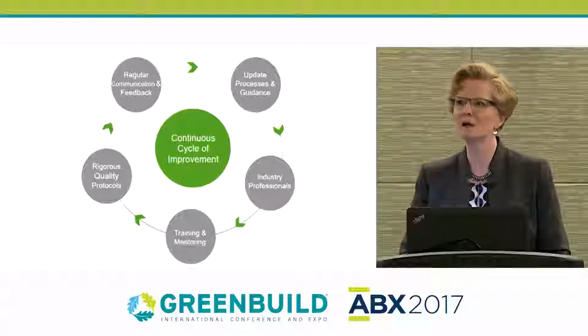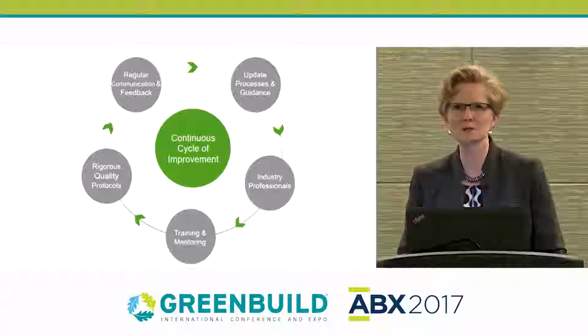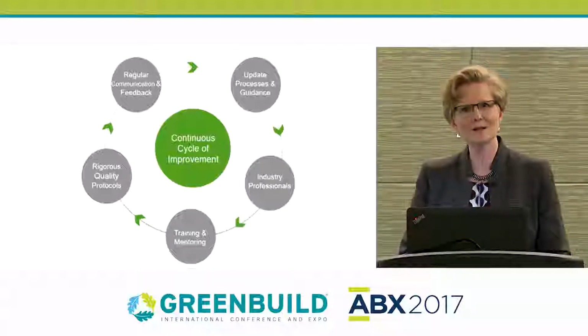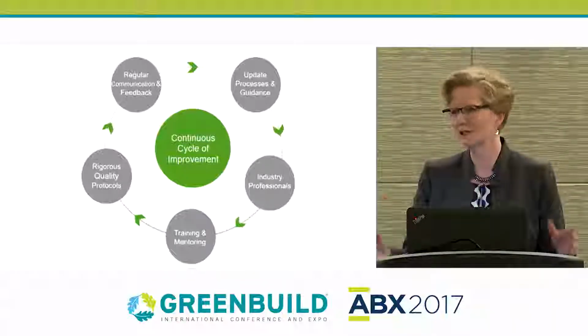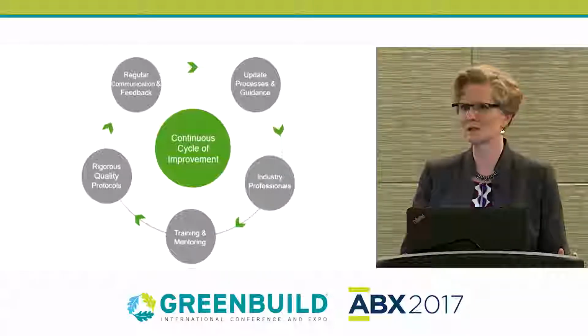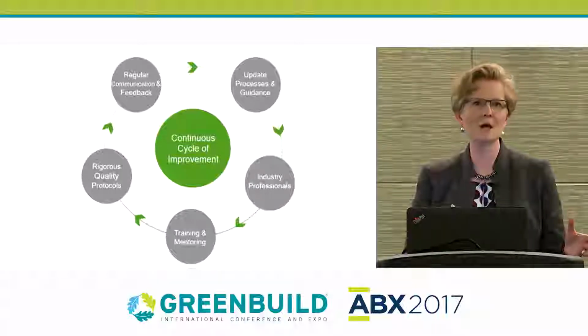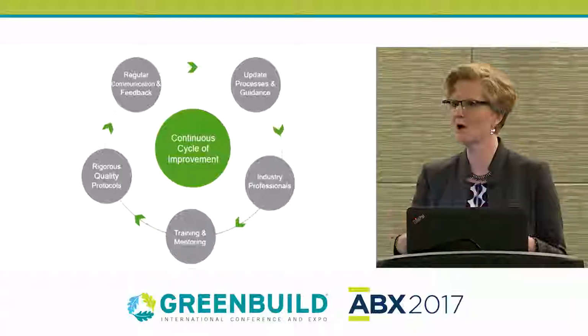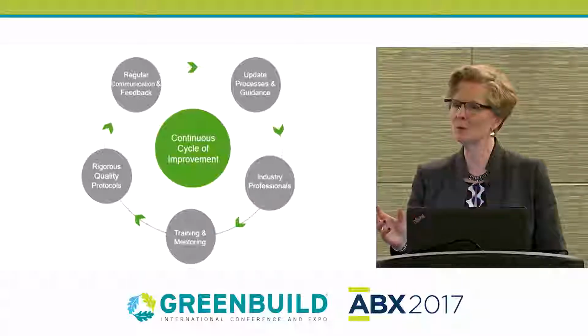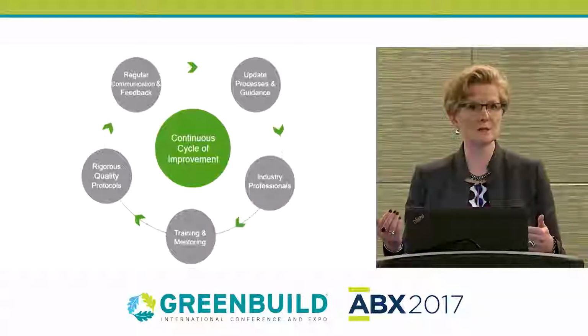We're looking to see if we can't start to move and shorten those timelines from 20 business days in 2018. But if you think about that BD&C project that you're submitting, and BD&C is the meatiest of them all, it's not that it takes us 4 weeks to review everything, but it goes through a process of being assigned. The primary reviewer does their draft, and then we do our quality control on it. And if it's a particularly tricky one, you might need to reach out to other experts.